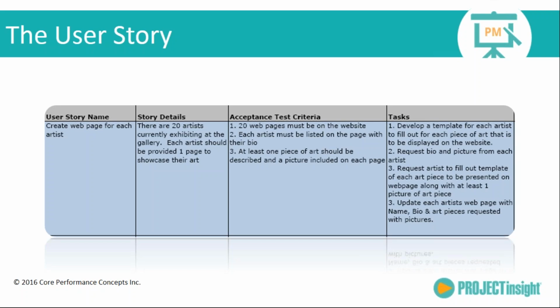Because if we're putting work into sprints, we need to know what we want to deliver, and how we're going to know that we get there. It really has to be very objective as to whether or not you've received it, whether you've gotten where you wanted to go. So writing the acceptance criteria is probably even more important than writing details on the story.